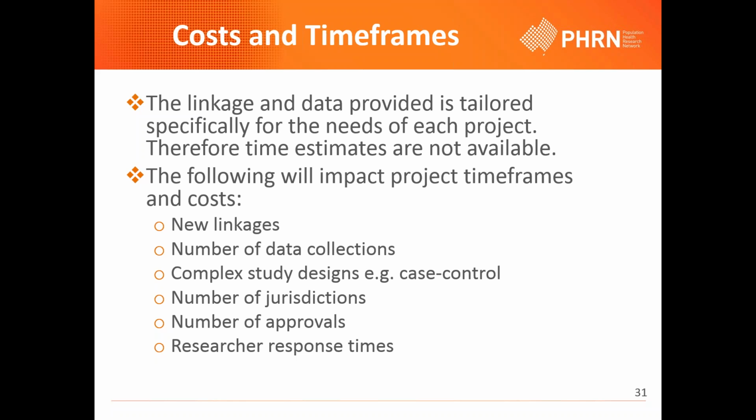Each data linkage unit has their own pricing and charging policy, and there are different charges for client services, for linkage, for geocoding, and for extraction. So it will differ a little bit from jurisdiction to jurisdiction. The charges will also depend on the size of your study, the complexity of the linkage, and what needs to be extracted.